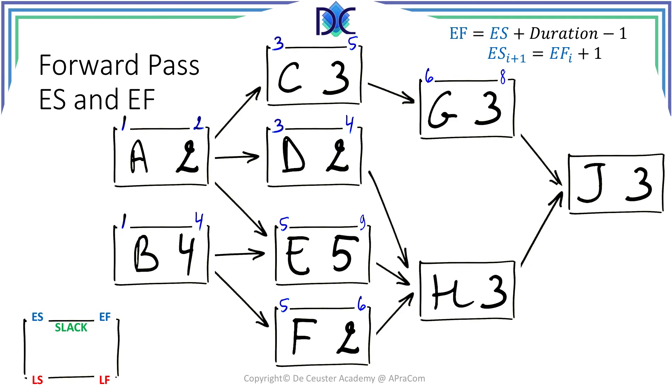For H we have now three predecessors. And now we have to look: D has an early finish on April the fourth, E has an early finish on April the ninth, and F has an early finish on April the sixth. And we see that activity E is determining the start of activity H. So H can start on April the tenth. 10 plus 3 minus 1, so H finishes on April the twelfth.